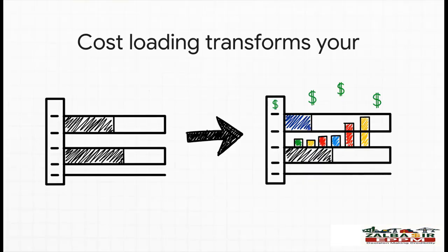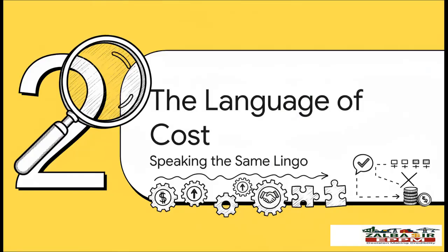A regular schedule tells you when work is supposed to happen. A cost-loaded schedule tells you when the money will be spent. That one little shift changes everything. It lets you forecast your expenses, manage your budget proactively, and make smart calls before you ever run into money trouble. Now, to manage costs well, we've all got to be speaking the same language.